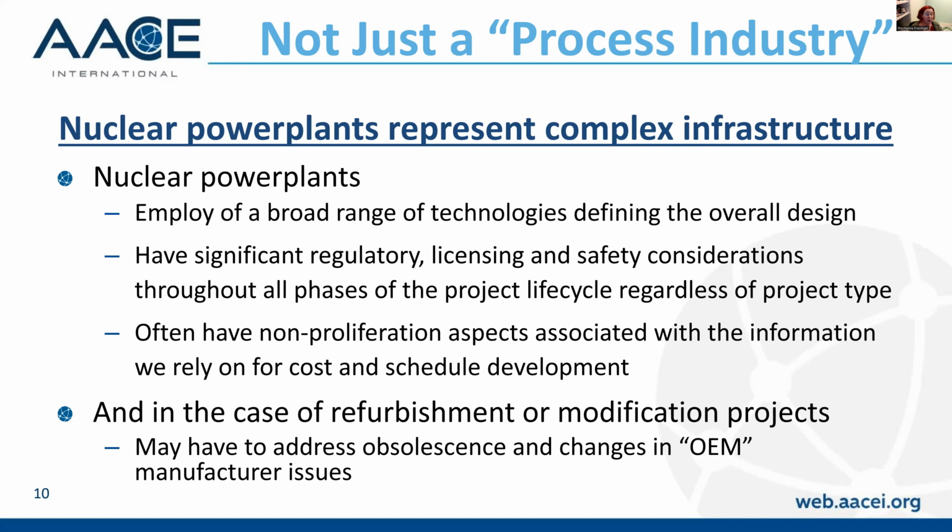And as we talk about refurbishments or aging plants that are dealing with license renewals, we may have to address obsolescence or changes in the OEM manufacturer, when we're dealing with OEMs that have stopped producing certain components, or worse, they've been bought out by somebody else, and through that process, the design and manufacturing specs for that original item have been lost.